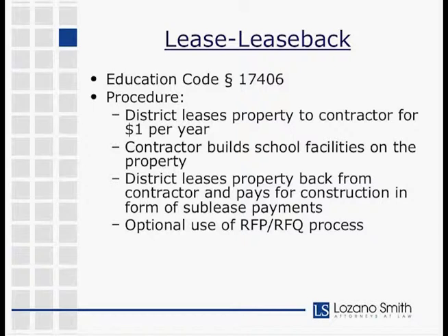First is that the district is required to have approved plans, approved by DSA, before it enters into a lease-leaseback contract. A lot of times we have districts that want to start its contractual relationship with the contractor earlier on in the process, because they want to foster a more collaborative approach with the architect and the contractor. That can be done through the use of a pre-construction agreement as opposed to entering into the actual lease-leaseback contract too early, because again, you're not supposed to do that under the law until after you have your approved plans in place.